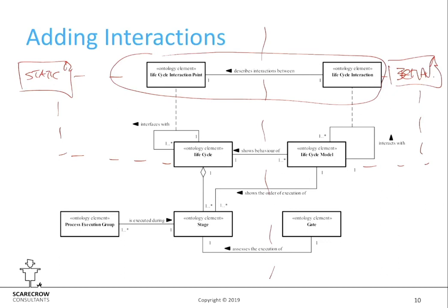But they hadn't acknowledged that there needed to be any interaction between those two halves of the development, and it meant that crucial interfaces and crucial design information wasn't shared when it needed to be, and it caused a massive delay on the project. So it's very important to actually think about these interactions.